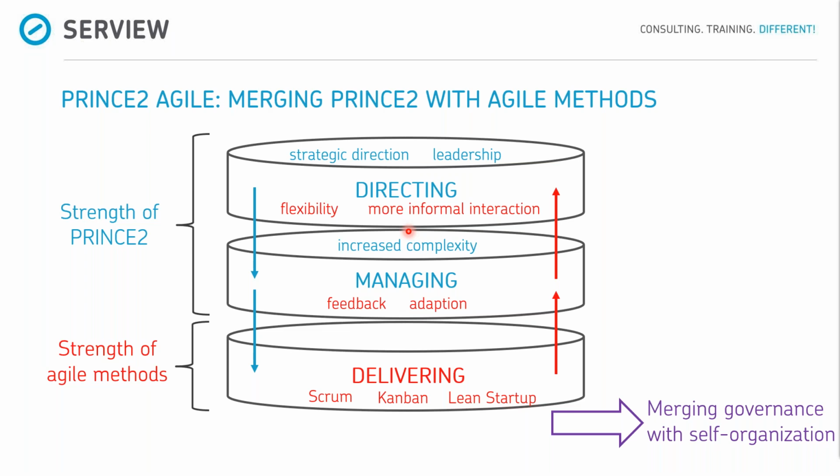So one aspect I have to tell you is the difference between a framework and a methodology. You see within Prince2 Agile, you can develop products, for example, with Scrum, Kanban, or Lean Startup. The difference between these frameworks and the methodology, Prince2 Agile, for example, is that you cannot manage a project only with frameworks, because frameworks only give you a frame and do not give you detailed information about individual process steps. In comparison to that, a methodology gives you any information you need for the next step. Methodologies describe every single step you have to do.